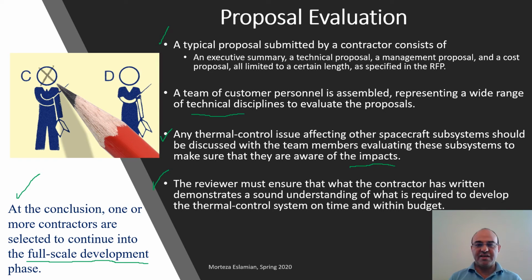The reason they have selected 2 or 3 is that if one of them cannot do that, or if one of them fails, at least the other one can do the project, or by competition. I mean, if the budget allows, that can be done. But in some other cases, for instance, if the proposal is to construct a bridge, of course you can only select one final contractor for this purpose.